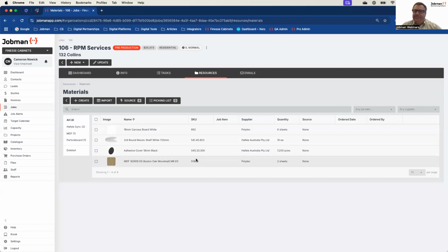The second big win is automation. If you've got a couple of purchase orders in your business and they're all off running around making purchase orders for jobs and shooting things out to suppliers, and you're losing that accountability, what often happens is things get double ordered. Worse still, you might place multiple orders to a supplier over a couple of days, which is quite inefficient. When you think about it, each of those orders is going to carry freight. There's more handling involved. It becomes smaller batch lots, which is more difficult to manage from a project management perspective for jobs. Whereas now, having this information in our system, we can batch all that information, put it together and make sure you're just sending single large orders to your suppliers to both mitigate and reduce waste and freight, but also keep it together. So when it lands, the team can see the items that have come in, whether they be allocated to jobs or stock, and know what to do with them immediately.